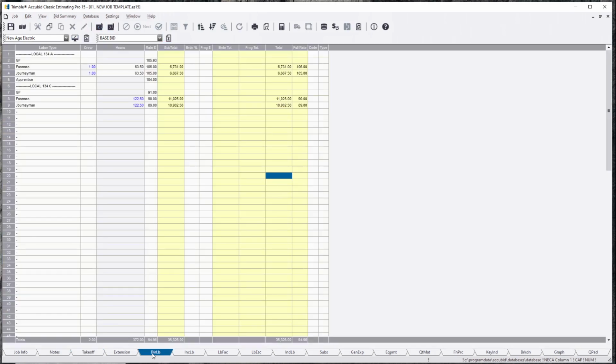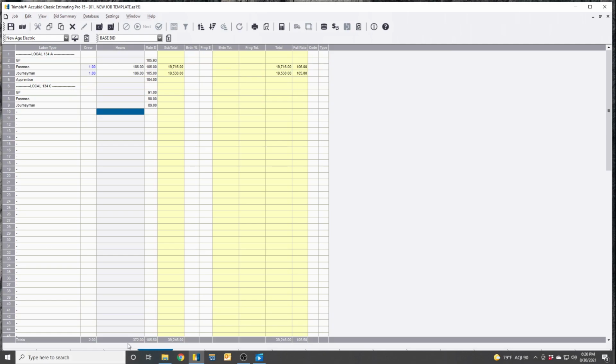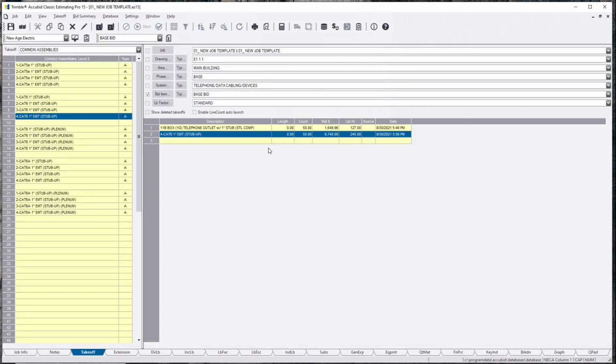We're going to go to direct labor. Your crew is always going to be 1, 2, whatever you want, general foreman, however you want to do it. I'm taking my hours directly out of this, so my pool of hours is taken from here. If I zero this out, that's where the hours are pulled in from. My C card hours are based on what my labor units are telling me right here.